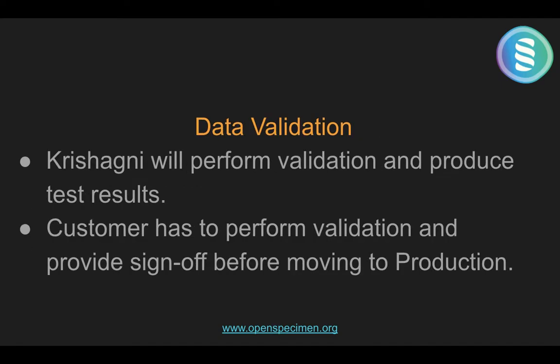Regarding data validation, once we have migrated all the data, the Krishagni team will perform the basic validation and produce test results. So after your mapping of legacy data, we develop some test cases for you. We will provide a report of executing these test cases. Simultaneously, we will also provide you with the count matching, that is the number of participants in legacy data versus the number of participants in OpenSpecimen. These many were successful, these many had issues.